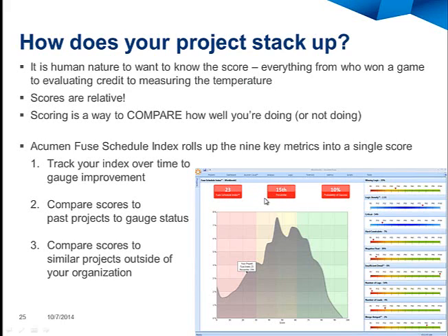It's only in the 15th percentile. That's pretty low. And in the 15th percentile, in our real database of real projects that we can compare you against, those projects in this case are only successful 10% of the time. So if my project scores 23 in the index score across those 9 metrics that I discussed today, projects that look like mine are only successful 10% of the time.